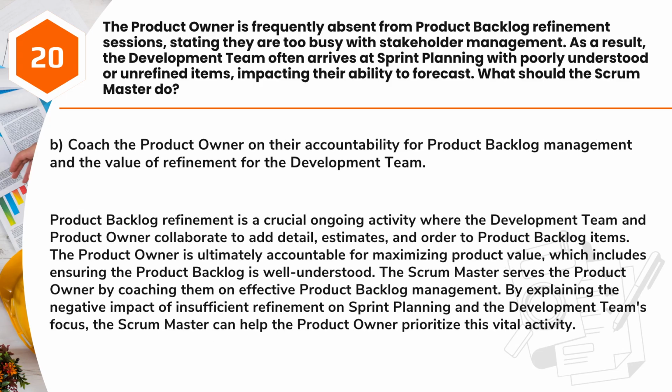Answer: B. Coach the product owner on their accountability for product backlog management and the value of refinement for the development team. Product backlog refinement is a crucial ongoing activity where the development team and product owner collaborate to add detail, estimates, and order to product backlog items.